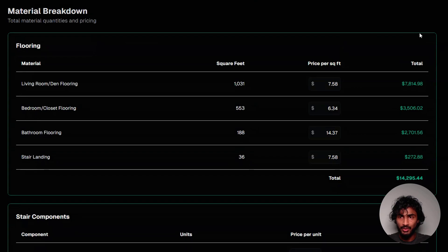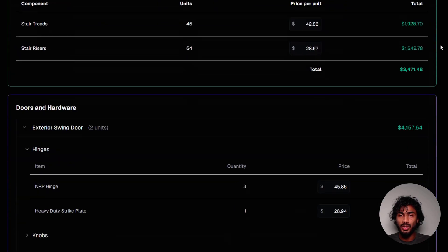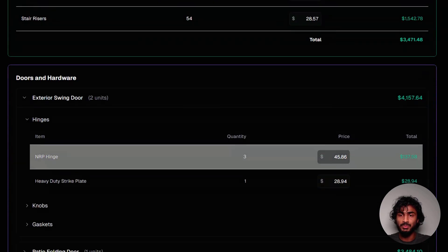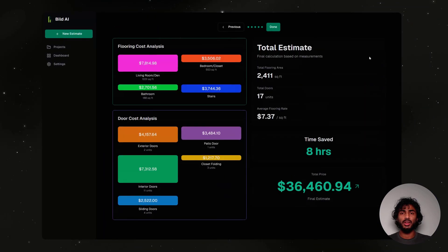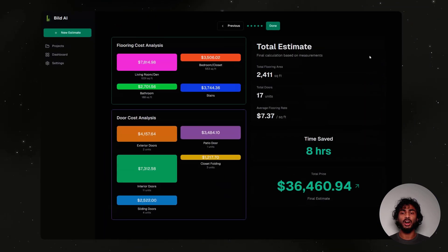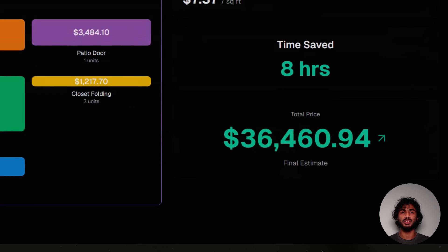We finally have all of the materials needed to create a cost estimate. We use rough averages, but you're welcome to customize based on local markets. Our total price comes out to $36,000.